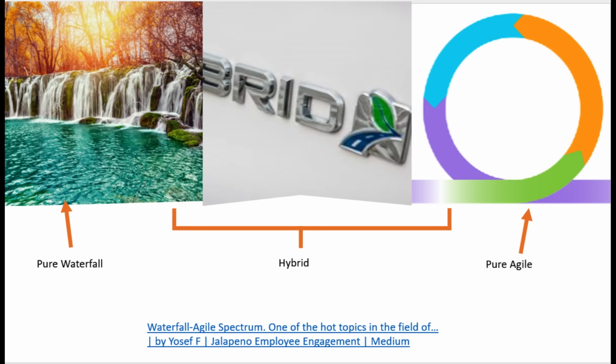Instead, the project is divided into 2 to 4 weeks time intervals, referred to as sprint in Agile methodology. The project team plans only for the scope of work included during this time frame. The key is to present the output of the sprint to the stakeholders and users and gain their feedback. Contingent on the feedback and other information coming into light, the next sprint is defined and worked on. This approach is continued until the project is completed. The documentation related to the closing stage is then carried over. Please note that this was an example. There can be different hybrid approaches depending on the contingencies and the needs of the project.